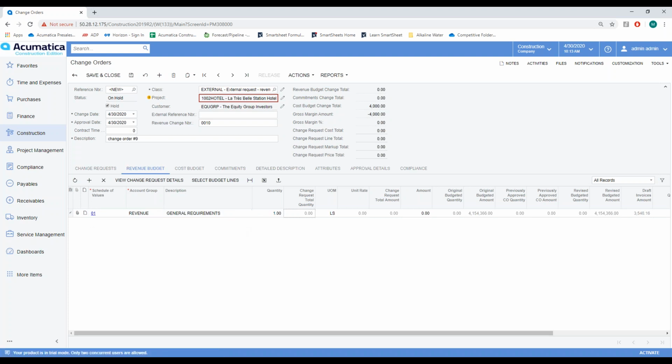So I'm going to go ahead and put in 1, and the amount, we're trying to mark it up about 30% or so. So I think we're going to probably end up putting in this total, it's $4,000 cost. So I guess what we would want is something like $5,700. And look at that, we're right at about 30%, which is a nice healthy markup. We'll leave that be and just save our progress while we're here.